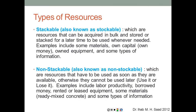Resources can be classified as either stackable or non-stackable. Stackable (also called stockable) resources can be acquired in bulk and stored for later use — examples include materials like wood, pipes, and electrical supplies; owned capital stored in a bank; owned equipment stored in a warehouse; and certain records or information.